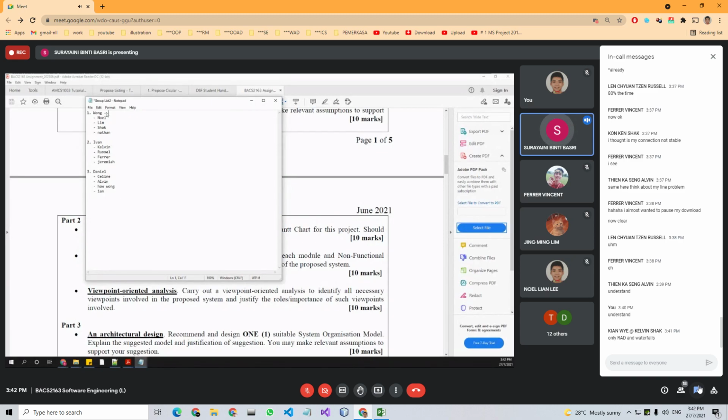Whatever is shown in the YouTube video, you apply it in your Gantt chart, like baseline, milestone, and indentation. For RAD, the first task should be your module, module by module, so you know later the cost based on the module: module 1, what is the cost, module 2, what is the cost.